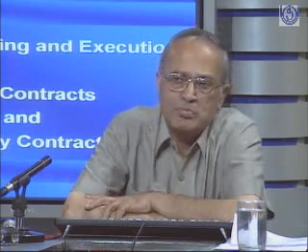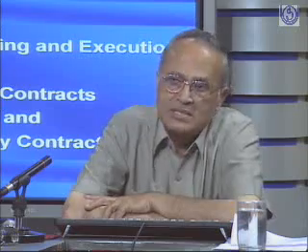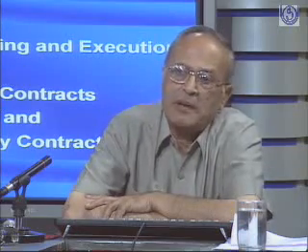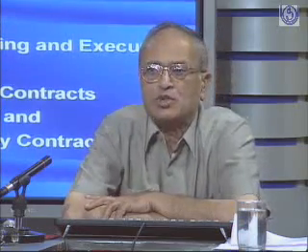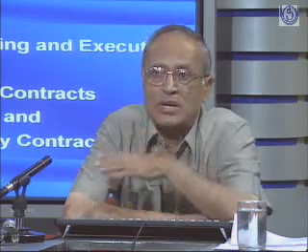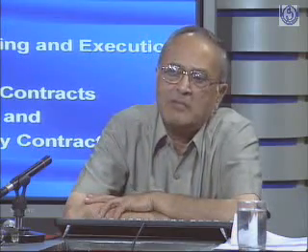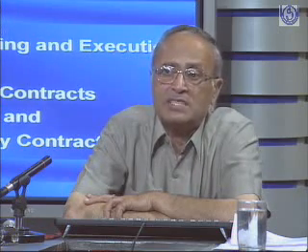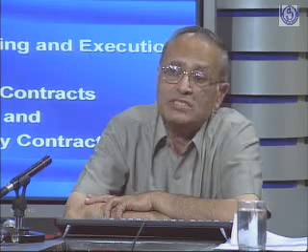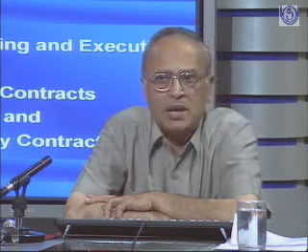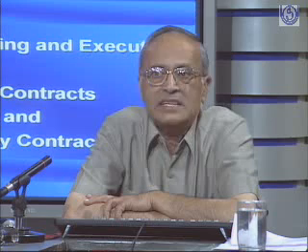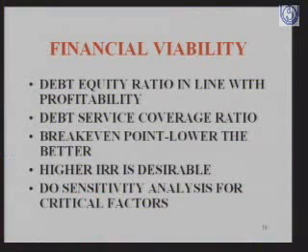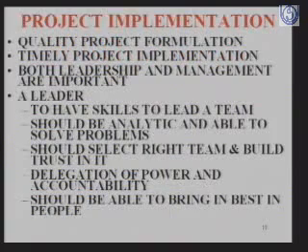For example, the power cost may go up, the steel price may also go up if you are in a manufacturing line, and my sales price may also go down. So all these three factors together, which are likely to happen, I will analyse; this is called scenario analysis. I will anticipate the various scenarios possible, the various permutation combinations possible, and see how my project behaves under these circumstances. This will tell me what I should be prepared for when I am planning or executing a project. And that is what the financial viability of a project means.